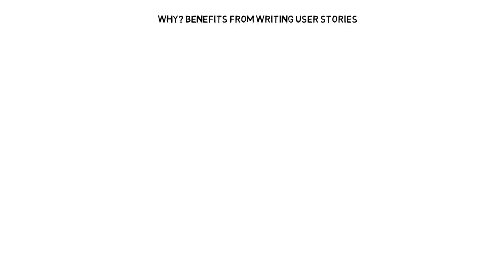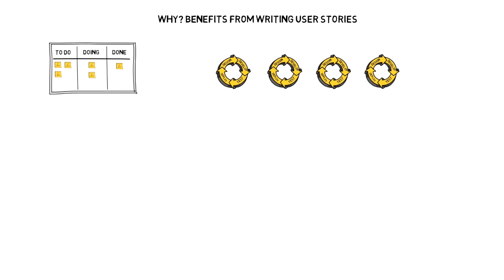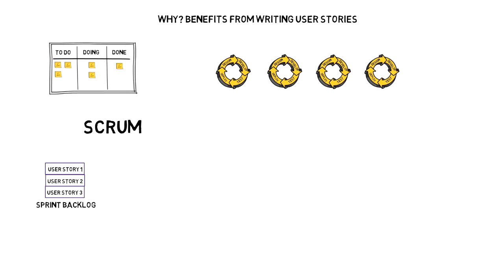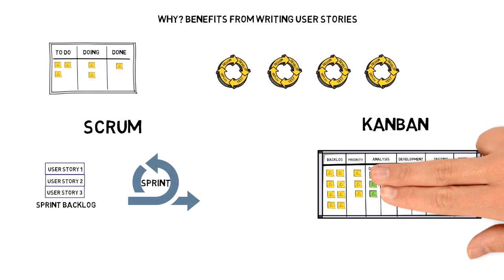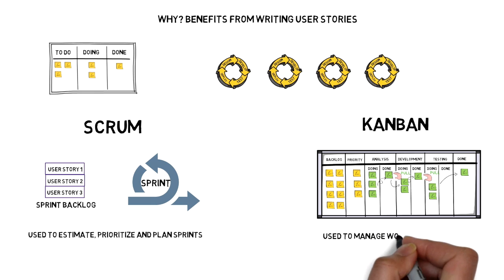What is the benefit of writing a user story? User stories emerge as a result of a need to break down projects into smaller incremental segments for sprints and iterations. Both Scrum and Kanban teams greatly benefit from writing user stories. In Scrum, user stories are added to the sprint backlog and worked on over the duration of the sprint. In Kanban, teams accumulate stories in a backlog and run them one by one through their workflow. Working on user stories helps Scrum teams make estimations, prioritize and plan sprints, leading to more flexibility and greater agility. Kanban teams learn how to manage work in progress, helping them stay on track and refine their workflows.